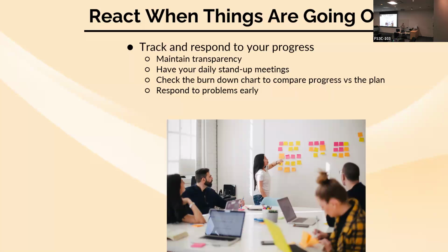If that happens, let me know, right? Just send me a message to let me know, like, I'm taking this from him and he's taking that from me, just so I'm clear on what everyone's assignments are. But yeah, you can do that. That is a legitimate solution during that process, to respond to those problems early so they don't cause you problems the day before the milestone turn. You correct these things earlier on, so you don't have any larger scale issues.